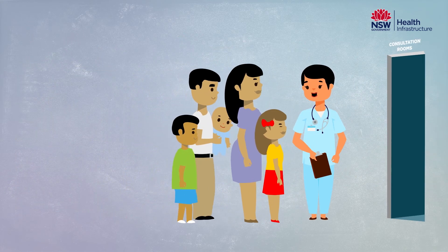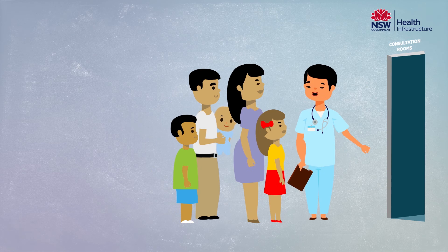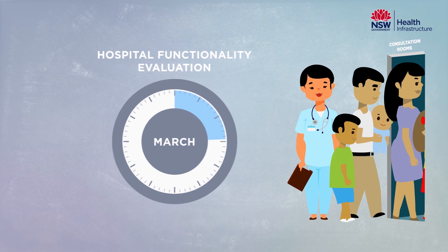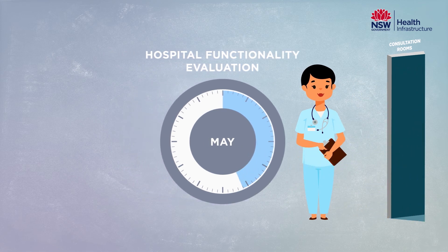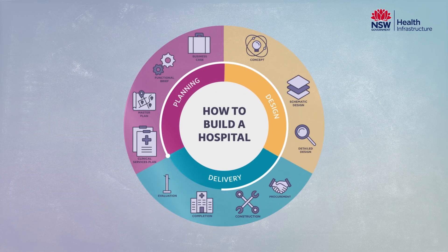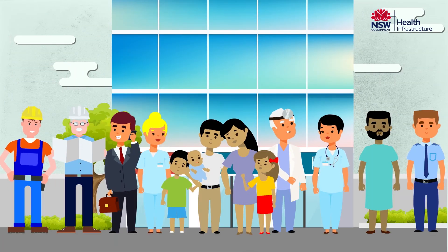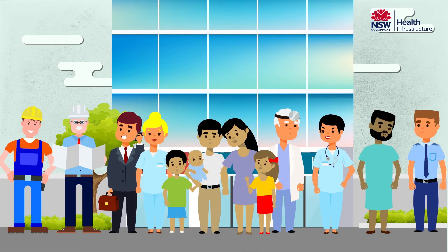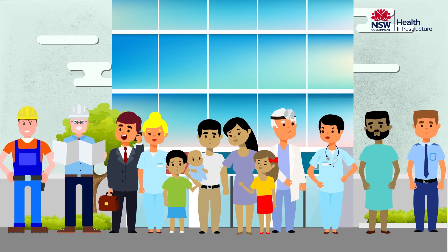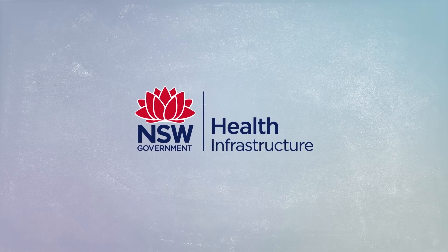Once staff and patients have moved into their new facility, Health Infrastructure continues to evaluate and assess the functionality of the new facility for several months. This process also helps to inform our future hospital projects. This extensive planning, design and delivery process ensures that staff, clinicians, patients and visitors have a contemporary, bright and welcoming facility that meets their needs and the needs of future generations.